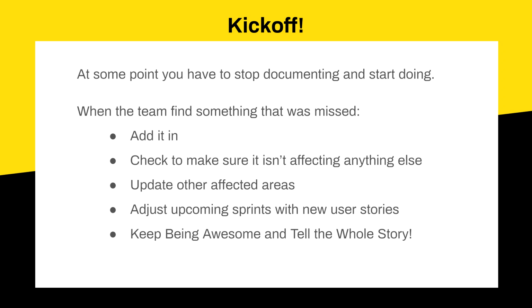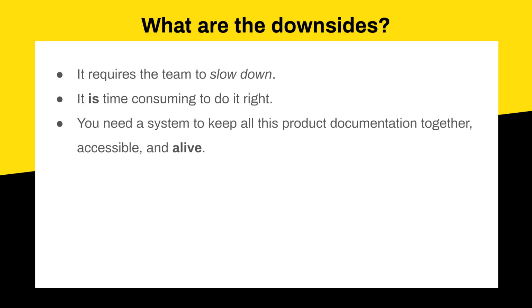You actually know what is done, what we are actually delivering, and if a change comes through, you can document that change order, the change request, toss it in there, and say, okay, look at how that changed everything. Here we go. We have everything in here to be able to see that whole vision and tell that whole story.